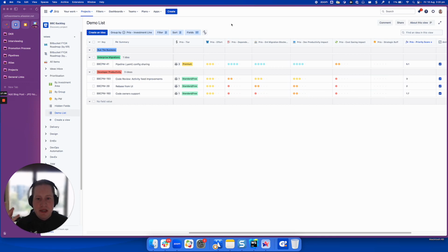Now, realistically, calculating effort at this kind of level of abstraction is next to impossible, and you will get yourself into trouble if you try to be too precise when calculating effort at this level, because realistically, you can't do it. You're going to be wrong. So we take a bit more of a conservative approach, and we say, well, look, rather than trying to say how many weeks or how many months something's going to take, because realistically, you're probably going to get it wrong at this point in the process, we look at it a bit more subjectively and say, well, look, based on this feature, what is the measurement of time you would use if you were asked to estimate its level of effort? Is this something that you're going to be able to do in weeks? Is it something you're going to be able to do in sprints? That's per fortnight or per 2 weeks. Is it something that you're going to be kind of thinking in terms of months, quarters, or years?